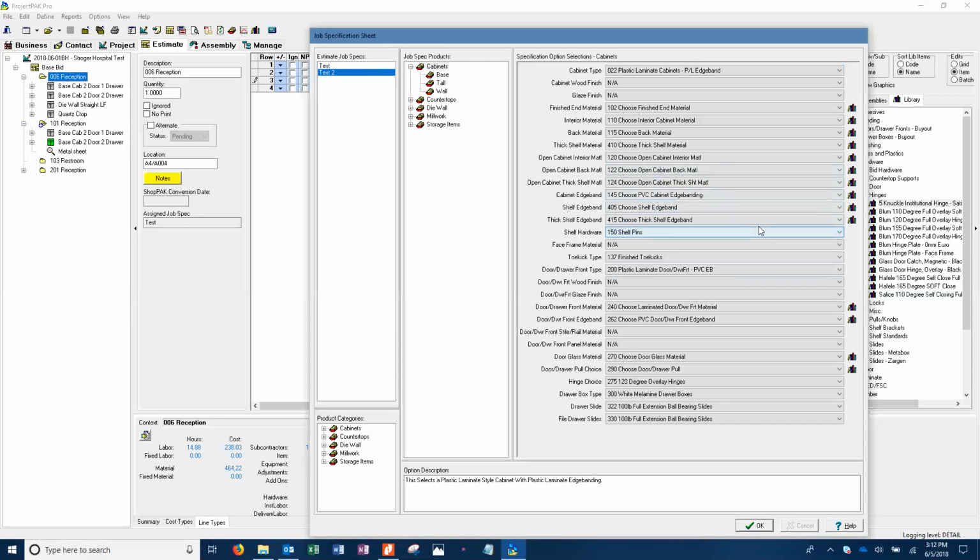and then as you go down the list here, you'll notice the things you have to change. So the first thing you notice is cabinet edge banding. It says PVC down about 5 from where you are. So if you drop that one down and you change it to laminate edge banding, you'll notice that the library books on your right turn to gray, because what you had there was PVC, and now you've told us, I don't want to use PVC, I want to use laminate. So you need to click on those and assign the correct thing.